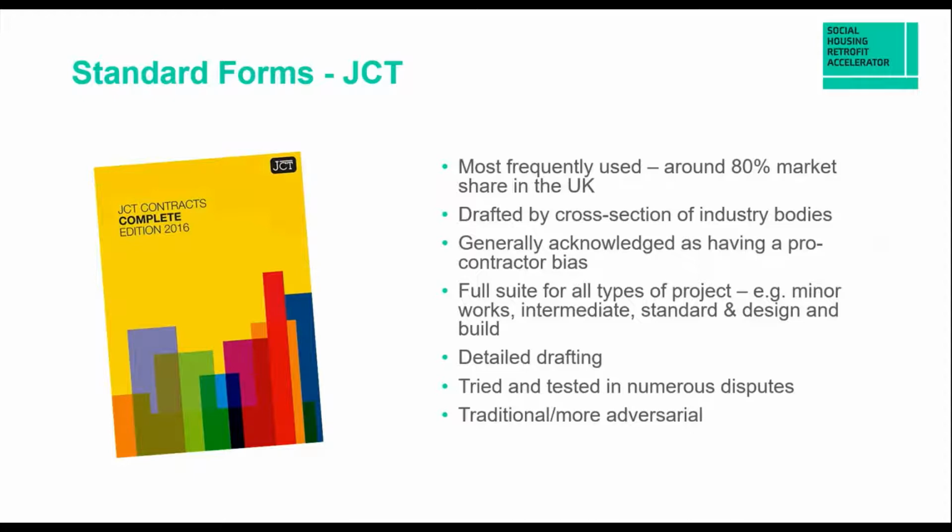As you can see from the picture on your screen there, the latest version of those JCT contracts is the 2016 edition. JCT, the next bullet down, has detailed drafting. It contains most of the elements that you may need for a construction project. It is tried and tested in numerous disputes, owing to the frequency of use really. But it is seen as a more traditional or more adversarial contract, so it's not known as being a collaborative form of contract in comparison with the NEC.